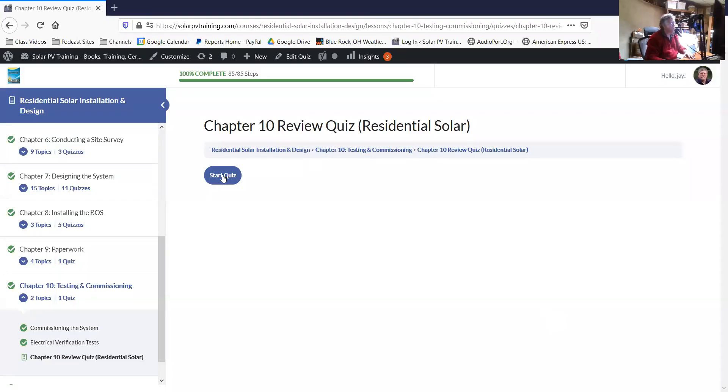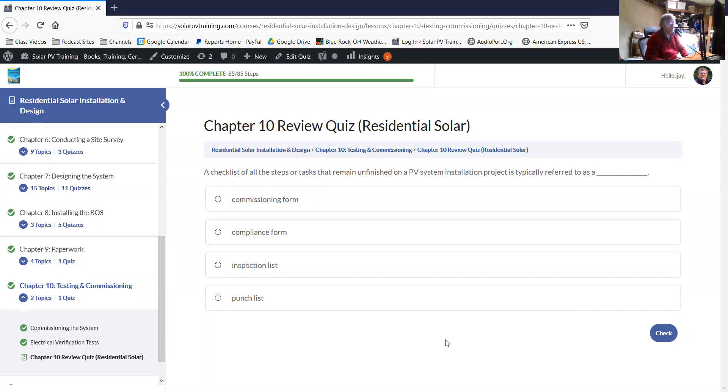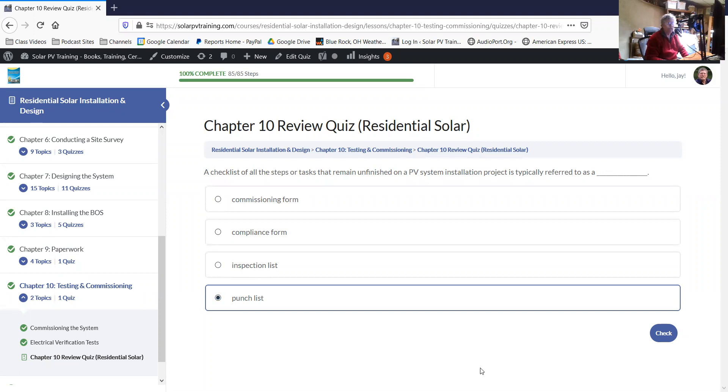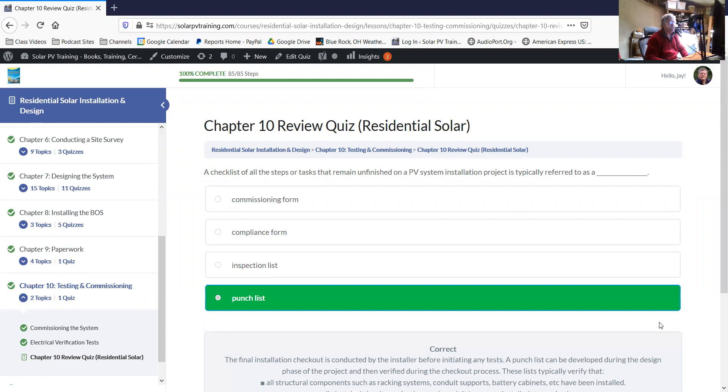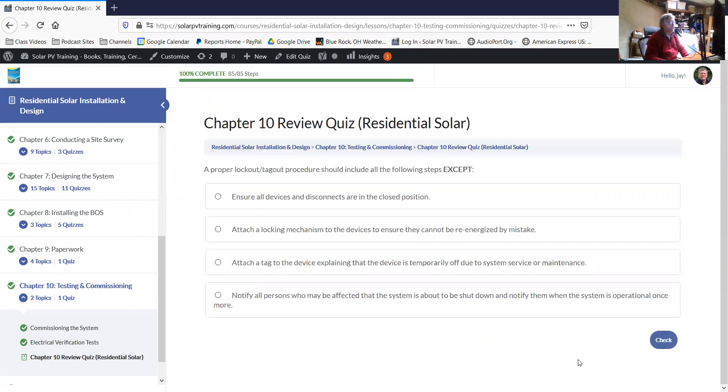Chapter 10 is the chapter about testing and commissioning. A checklist of all of the steps or tasks that remain unfinished on a PV installation project is typically referred to as a punch list. You're just making a list of everything that's not done. That's usually something that you would go over with the customer or the end user. As you check them all off, when you're all done, you're all done.